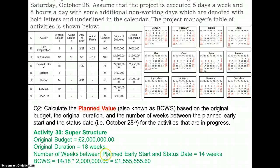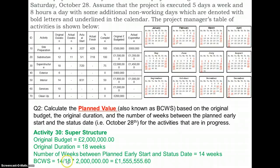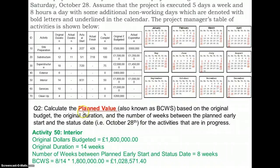The idea was that we would be spending money proportionally over the planned duration. The number of weeks which have elapsed between the project start date of 20th of July and the reporting date of 28th of October is 14 weeks. We can calculate that by this point in time we should have spent 14/18 × £2 million, which is around £1.55 million.